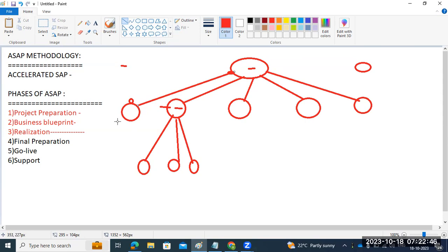So in this case, we will say that once the OS team hands over the systems to us, from that date onwards, we will take 4 or 5 weeks for building the new systems and initial configurations. Internally we will discuss and inform here. Then he will update the timelines in his slide presentation deck.